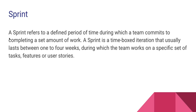Next, let's understand what a sprint is. A sprint refers to a definite period of time during which a team commits to complete a set amount of work. Once your story is in your backlog, you decide that in sprint A or sprint B - from a two-week or three-week duration - you are going to complete certain tasks. That is what we call the sprint. A sprint is a time-boxed iteration that usually lasts between one to four weeks.